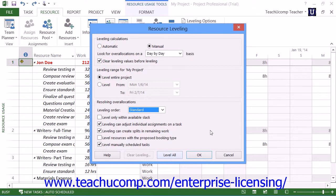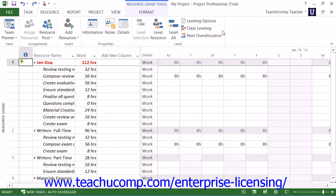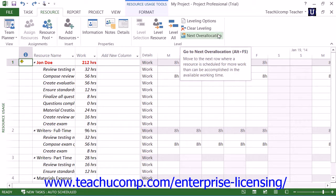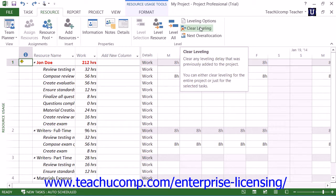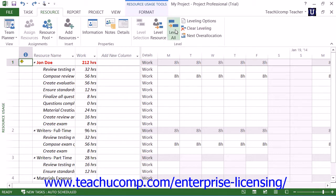Also note that you can click the Level Selection and Level Resource buttons within this same button group to level a selected task or resource within your project file to manually level resources one at a time. If you decide to manually level each resource or task individually, you can also use the Next Over Allocation button to select the next resource over-allocation to resolve. You can clear a resource leveling that you have applied by clicking the Clear Leveling button, which opens a dialog box where you can choose either the entire project or the selected tasks. Simply make your choice and click OK to remove the resource leveling that you've applied.